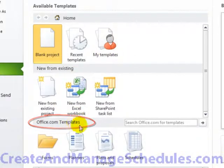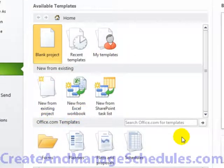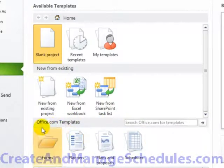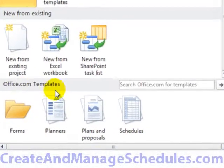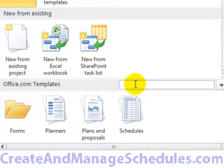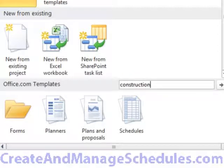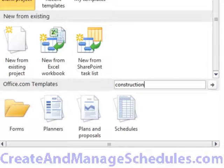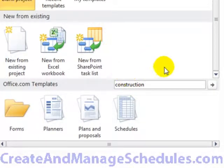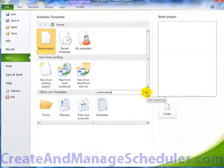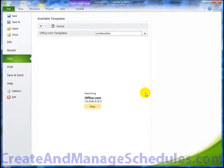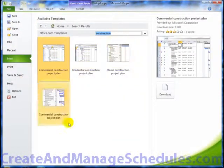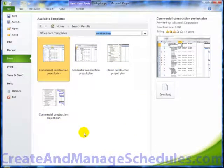Let's say this section down here is the Office.com templates and if you wanted to search for a specific type of template, you would actually type in that type right here. So I'm going to type in Construction and then I'm going to click on the Search button here to start searching for construction templates. And it came back with a few results sets.